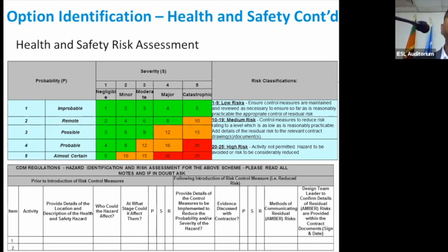And in the designer's context, we developed what we call the SHE box, the safety, health, and environment box. If you see very critical items, we show them on the drawings, because contractors should be aware that there are certain health and safety requirements or issues if you do not follow the sequence.